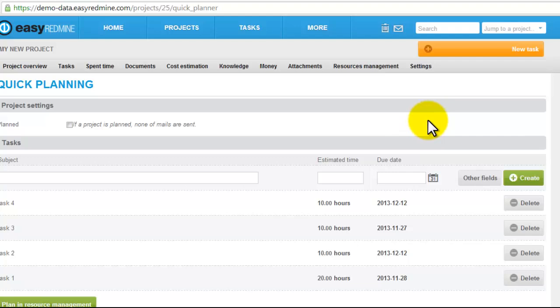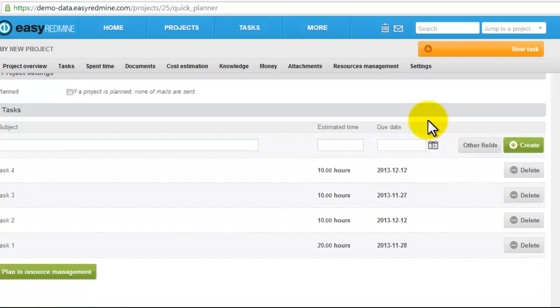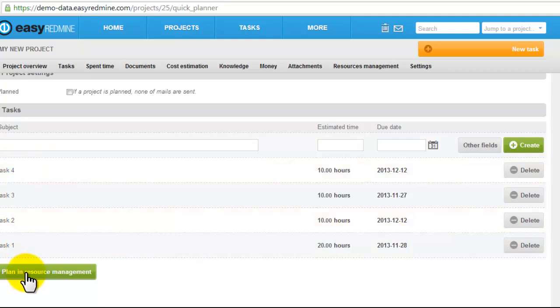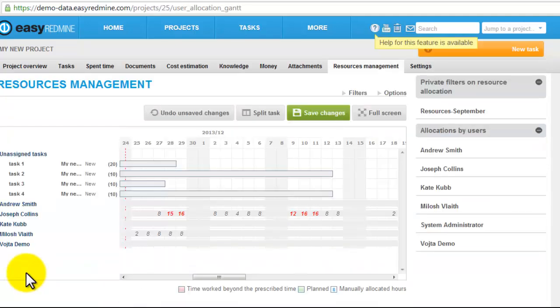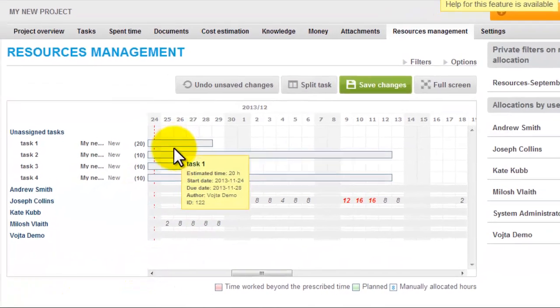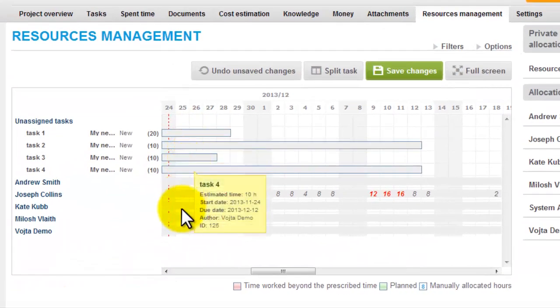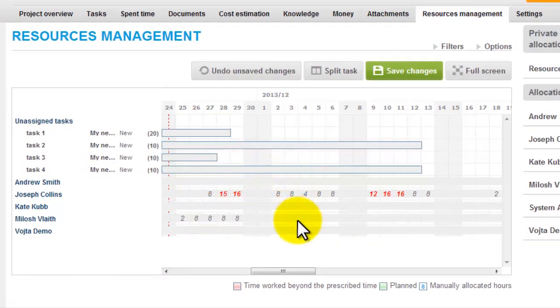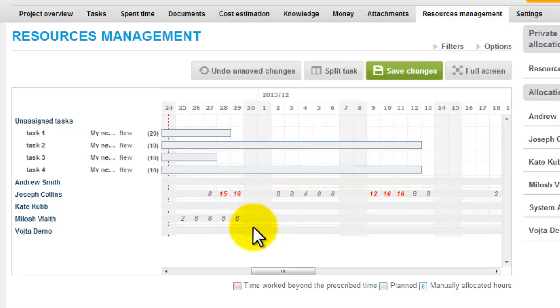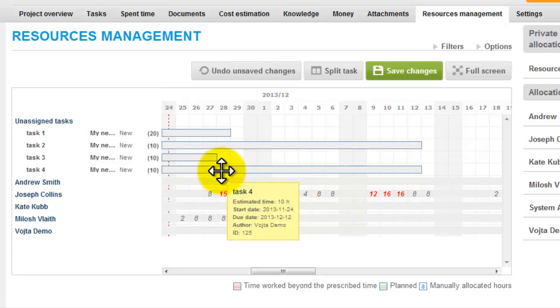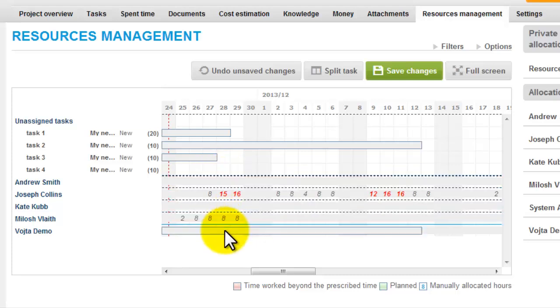You can create as many tasks as you need and afterwards just click plan in resource management. Here you can see unassigned tasks and your project team and its utilization. Via drag and drop you can assign the tasks to particular people.